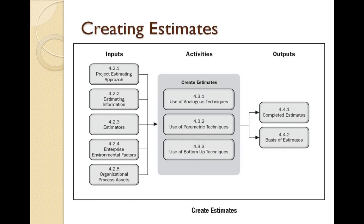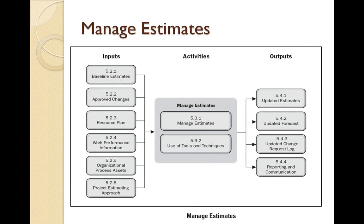The next phase is creating the estimate, where we use the finalized project estimation approach. We use all estimation information — the project requirements document, scope document, risk registers, and all available information. Estimators provide specific estimates. Enterprise environmental factors and organizational process assets are also considered. If the organization is CMMI or ISO certified, its process requirements must be factored in. Estimates fall into three categories: analogous estimates, parametric estimates, or bottom-up estimates. Completed estimates and their basis of estimate are documented for further reference.